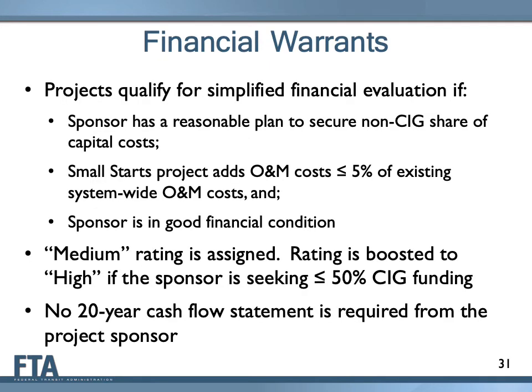Financial warrants, like project justification warrants described earlier, are a pre-qualification approach that allows a project to receive automatic ratings on local financial commitment. Small Starts projects can qualify for this highly simplified financial evaluation if the project sponsor can demonstrate it has a reasonable plan to secure funding for the non-CIG share of capital costs, the additional operating and maintenance costs to the agency of the proposed Small Starts project is less than 5% of the project sponsor's current approved operating budget, and the project sponsor is in reasonably good financial condition as demonstrated by the past 3 years'